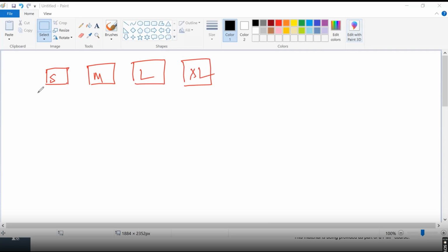Now, if we have to assign them something called story point, which will help you find out the effort required to solve that, a small story point can be assigned when typically we have to pick up a number from this sequence, which is the Fibonacci sequence: 1, 2, 3, 5, 8, 13. These are the story points which will come based on the Fibonacci sequence. You have to pick up a number based on the sequence only.